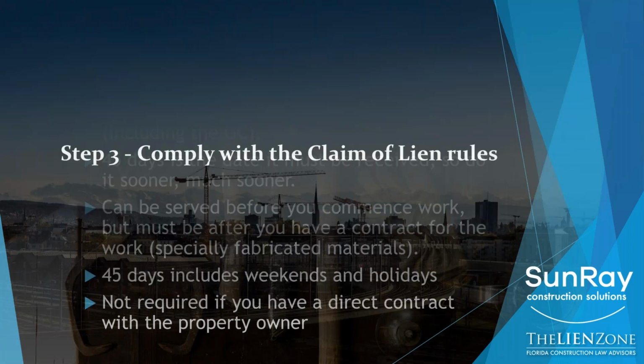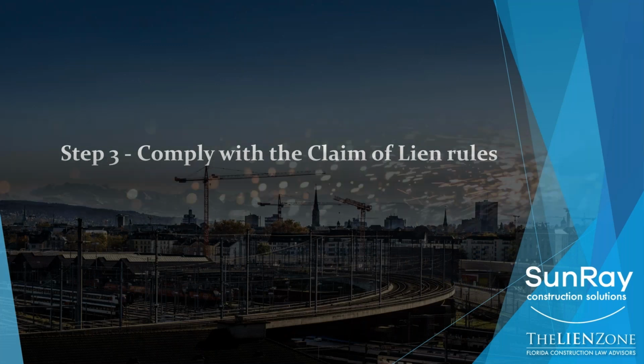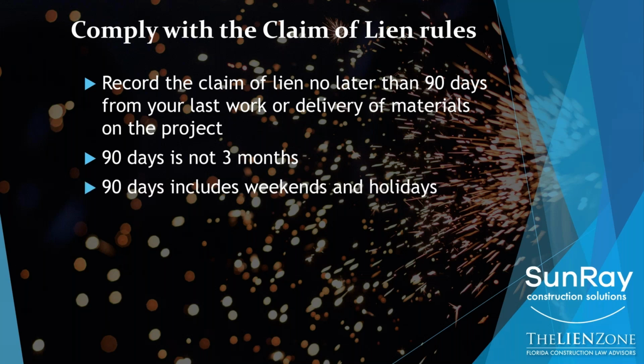Step 3, comply with all the claim of lien rules. So you need to record your claim of lien within 90 days from your last work or delivery of materials onto the project. Remembering, of course, that 90 days is not 3 months, right? Some months have more than 30 days, some months have fewer than 30 days. 90 days, just like the notice to owner rule, includes every weekend and holiday.